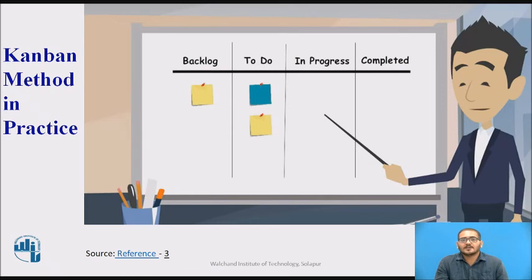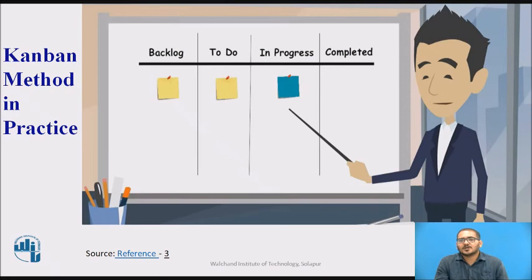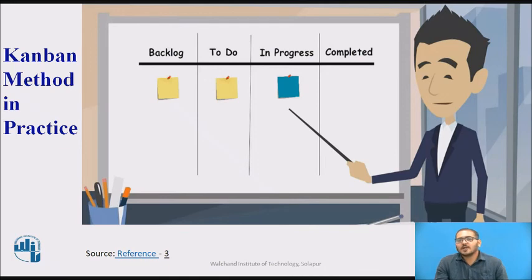As work becomes ready for the team, the product owner moves the task from the backlog to the To Do column. In the Kanban system, the topmost card has the highest priority, so there is no confusion as to which task needs to be worked next. As work begins, the card is pulled from the To Do column and placed into the In Progress column. During its journey through the board, participants can add notes, change ownership, and even invite others to participate, so everyone on the board knows exactly what is going on at any given time.